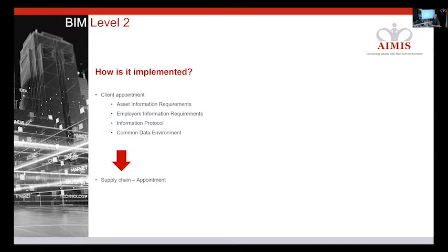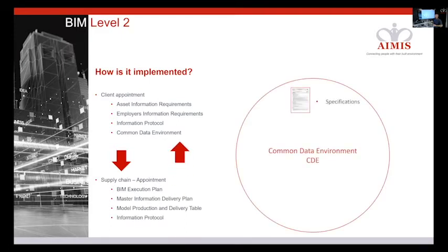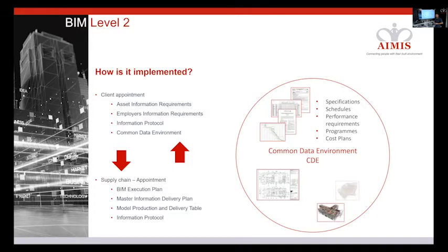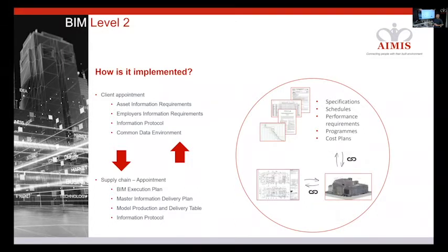The supply chain would then respond again to that, having been appointed, with a more detailed post-contract BIM execution plan. This would include information about the information deliverables, the master information delivery plan, to what level of detail they're going to be delivering the information in, and with the information protocol throughout their supply chain. And all of that information should be managed and shared, structured within a common data environment, which should have been obviously implemented by the client.